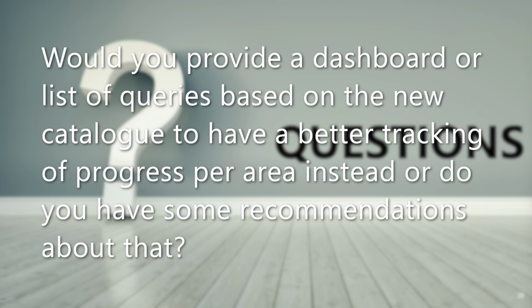So what Ajit said is you could create a higher level epic, which is say the next release, and nested epics for your L2s, or use the tags to then provide a means for ADO queries to separate the parallel process areas. And I agree. I do like the idea of some sample queries or dashboards, and we will put that into our backlog of ideas.